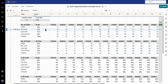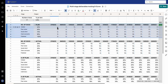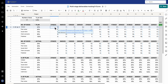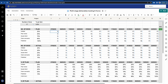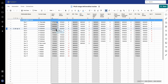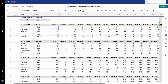So let's save there. There's a lot of calculations going on in here. What you can see is I've got a section here to say: what was planned? What it's doing is taking this number here — it's looking at a date and saying: for the week commencing 27th, how many documents were due to be done? So that means anything with a date less than the 6th of March was due that week. Let's just look back at the tracker — these top four items were all due before the 6th of March, so the count is four.